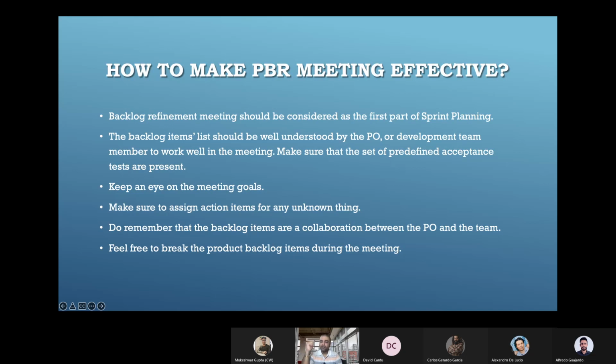Why so? Because nobody is deciding which story which team member is going to pick. Correct? There is no preference as such. Only in a few exceptional cases can you shuffle things, and that too internally, working with the team. But what is the process? If there are 15 or 20 stories in the sprint backlog, then we pick up the topmost, the first card, then the second card, third card, fourth card. That's how we work in a prioritized manner.